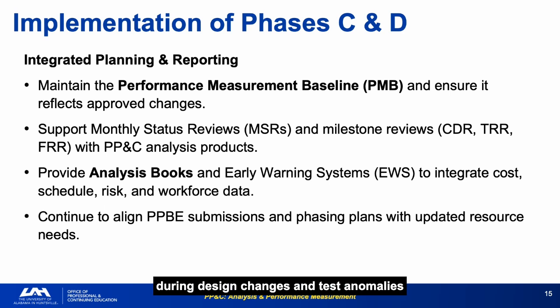Trade studies during design changes and test anomalies are where PPNC adds the most visible value, translating engineering options into cost and schedule impact. If PPNC is not in the room during trade study discussions, the decisions that come out of those rooms will not have integrated cost and schedule inputs.